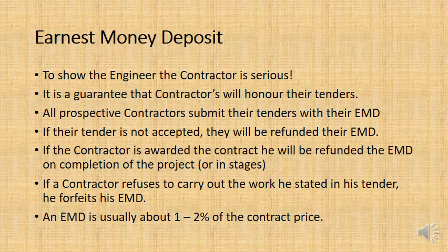So if you refuse to do the work, you will not be refunded the EMD. And so this is a way to make sure that everyone who submits their tenders, they are serious. They are serious that they will honour their tenders if they are awarded the work.